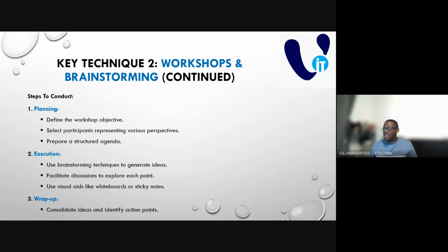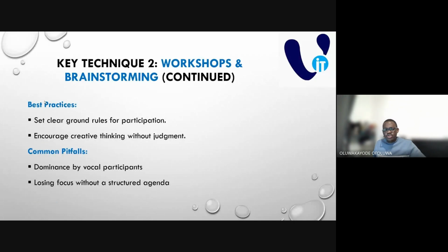Very, very important. I always say this, which is best practice anyway. I always say this every now and then. When you're going into your workshop, I look for opportunities to bring in the project sponsor most of the time, because they have the final say. So especially when you have very difficult stakeholders, the project sponsor can always bring them back into the conversation that we are having, because they have the final say anyway.